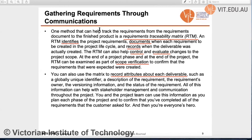We can also track requirements using a Requirement Traceability Matrix, or RTM. The RTM identifies the project requirements, documents when each requirement was created in the project life cycle, and records when each deliverable was created. It also helps to control and evaluate changes to the project scope, and can be used for scope verification. Additionally, the matrix can record attributes about each deliverable, including a unique identifier, description, and requirements of the project scope.